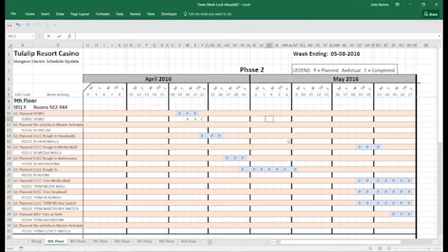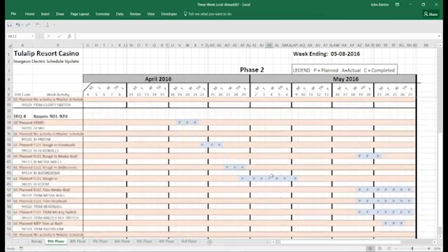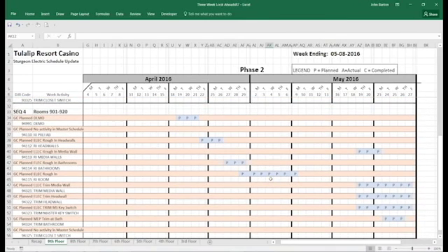And that's not the way we originally bid the job, and it's definitely not the way to make any money on a job. So then we can sit down with the general contractor with good information, show him what we're up against, and let him try to fix that problem. And if he can't fix the problem, at least he knows that he needs to compensate us for the lost time of moving guys around and around and around.